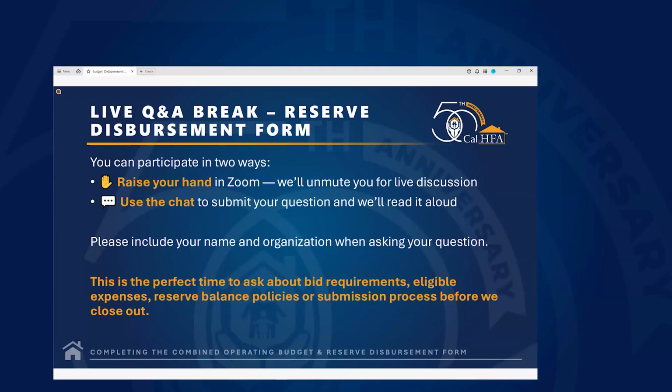Okay. As in regards to the pecking order, when it comes to CalHFA and HCD, if we're both involved in the project, CalHFA has the senior approval. Actually, we'll have the final approval in the replacement reserve or any disbursement that CalHFA is involved in.